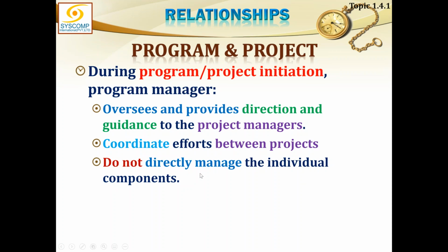This is not allowed, and you will definitely get certain questions in your exam pointing towards this. You do not create the WBS for the projects. You do not plan the project management plan. You just create your program management plan. Then you become the sponsor for the projects. The projects under the program, you are the sponsor as a program manager. And it is your role.